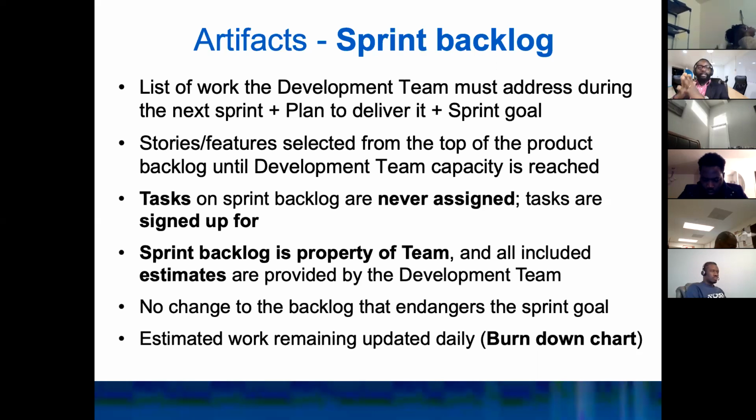So the product owner is going to tell them, okay, we need to develop this feature and this feature and this feature. What is the estimate for those? That's the role of the dev team, who's going to say, based on the details that we've seen and the refinement that we did, we think it is complex enough to be a 3 or a 4, or not a 4. If you go on a Fibonacci, you probably don't have a 4, but it's a 3, a 5, an 8, a 13, right? Is it a 21, etc.